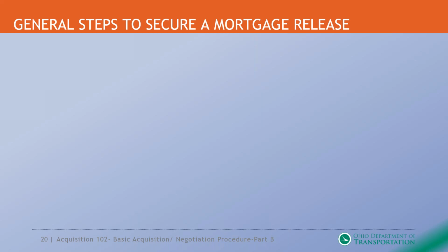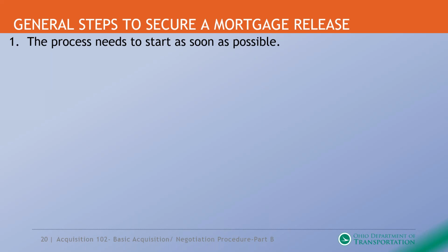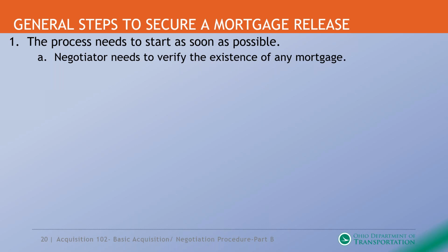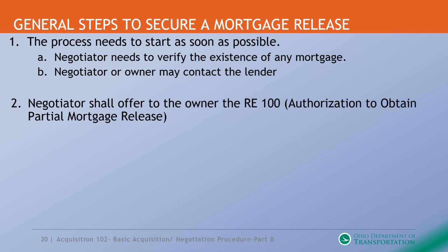General steps of securing a mortgage release. Okay, you want to start this process as soon as possible. It takes a long period of time to be able to acquire one of these and the various hoops you have to go through. So the negotiator needs to verify the existence of any mortgage. The negotiator or the owner may contact the lender.